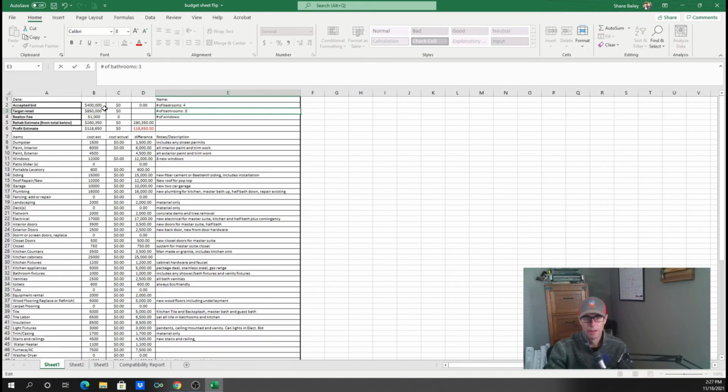All right, so there you go. If we get it at $400,000 and we sell it at $850, which is again conservative, it could probably get between $875 and $900. It just depends on exactly what ends up happening with this home as far as the build itself and the rehab. Rehab costs about $280,000 ish. And again, I went up on some of these numbers until I have an idea, but this gives me an idea of where we'd be at. All right, the initial number, because the spread is about $450,000, I'm looking to make around 118. Things can change. I could be as low as 80. I could be up in the 130s too.